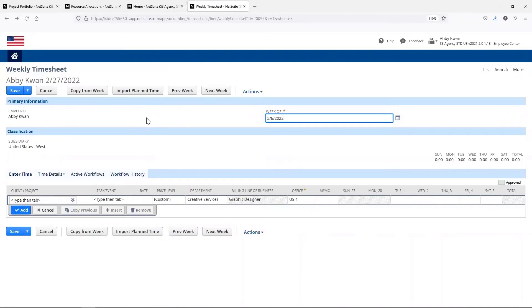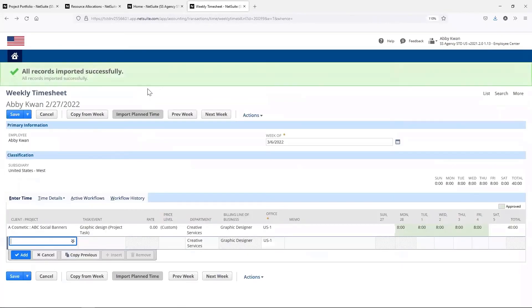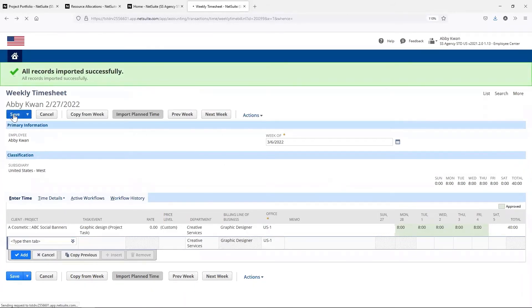She can log hours as she works or enter all of her time for the week at once. She can also import the time she's been assigned and make corrections as needed for greater efficiency. When she saves this timesheet, the time will appear as actuals on the project so the project manager can track the budget versus actuals.